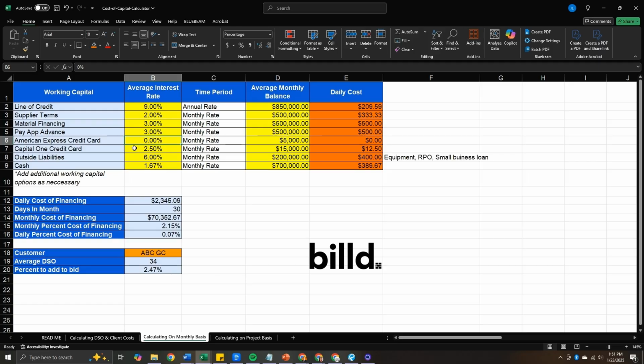You'll notice there are two credit card types. One has a 0% interest. That's for things like fuel, day to day material at Home Depot, or something like that. The other one is 2.5% to simulate the card that you use to pay a vendor purchase and adding a 2.5% convenience fee in case a supplier term is maxed out, or maybe a superintendent goes and picks up material on their credit card since they didn't have a purchase order.